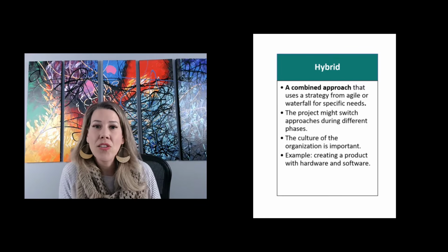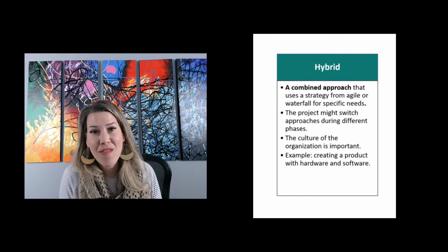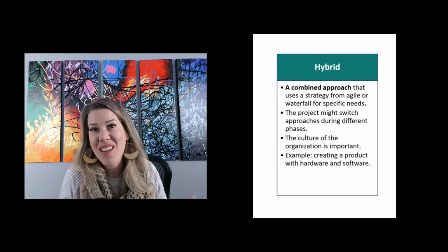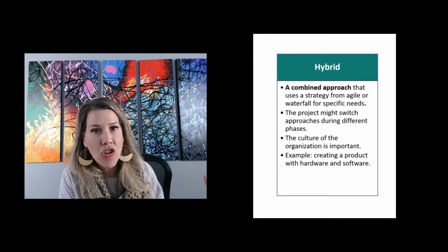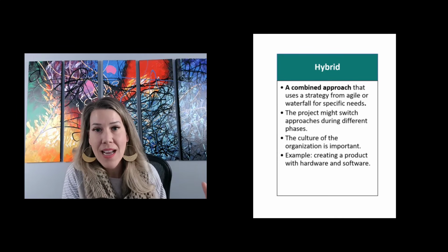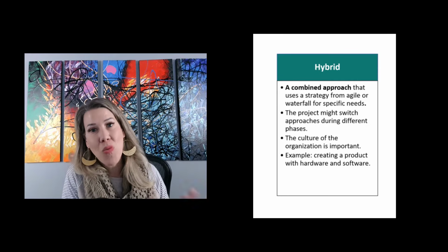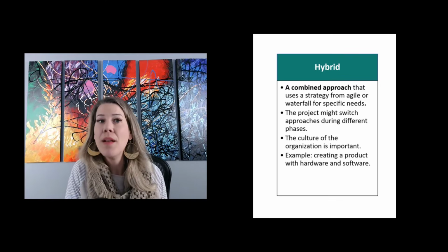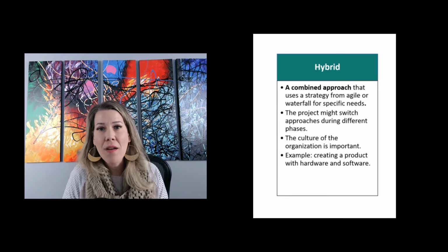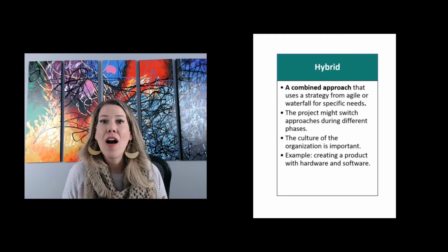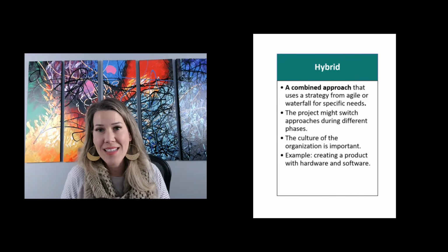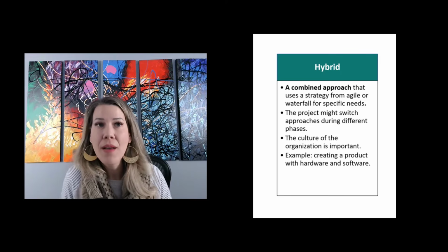Because if you think about it, when changes are expensive, when there's a lot of physical or tangible items being used with a project, then waterfall is generally best so that we can do all of that planning up front and eliminate work and waste, because that gets really expensive when we're talking about projects. When we're talking about software and making little tweaks here and there, if we need to change something, it's not these huge expensive items.